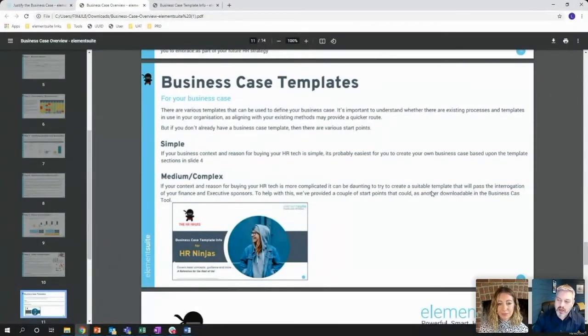Generally speaking, people will say, right, let's take these 2 modules, these 3 modules. If you haven't got an HR system, HR normally would go first, because that feeds the employee data to all the other systems and keeps you that single version of the truth. But I think it depends mainly on your heat map. A lot of red, just go for it and do everything in one go.